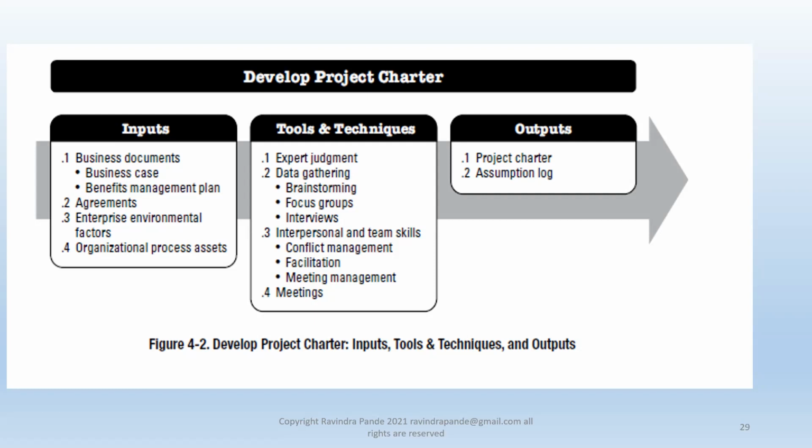So an assumption log is basically any and all assumptions you normally make to get your project to succeed. It can be that everybody will come to the office and start working at a specified time. Somebody might get stuck in traffic, somebody's health might not be well, and all those things. All these assumptions normally get applied to the risk register as risks.